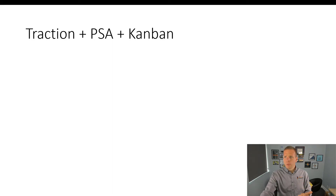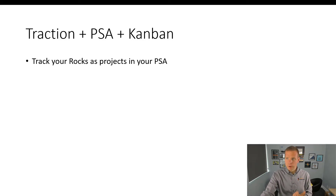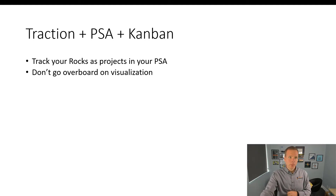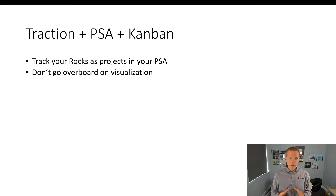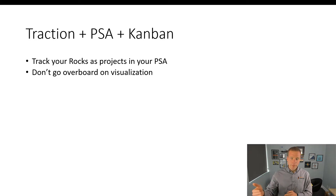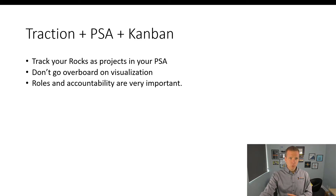So how do you combine Traction EOS, your PSA like ConnectWise or Autotask, and Kanban? We track the Rocks as projects in the PSA. An important thing is not going overboard on your visualization — if you set up your Kanban board and everything is red, then basically nothing is red and nobody cares. Define what good means and highlight the things that matter. Roles and accountability are very important both in Traction and in Kanban — who owns the boards, who sets them up.